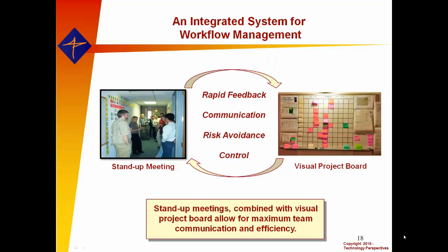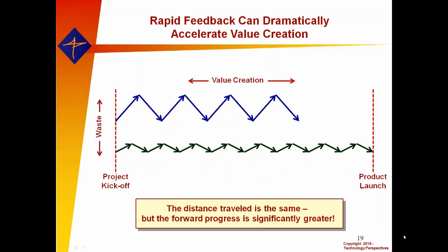Short duration, but somewhat more frequent than the typical weekly or biweekly hour or 2-hour-long dirge that we typically use for team coordination. This is more energetic, it's more focused, and of course it's tied now to the other tool, which is some form of a visual project board. The team meets in front of the board, which is updated in real time in the stand-up meeting. It always represents, 24/7, the current status of the project. So between those two things, what we have is a rapid feedback and control system. And this kind of illustrates why that can help you.